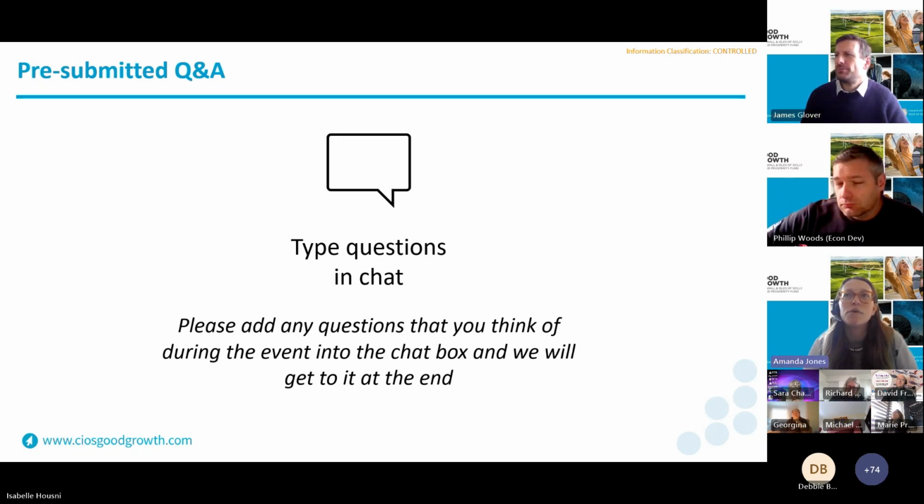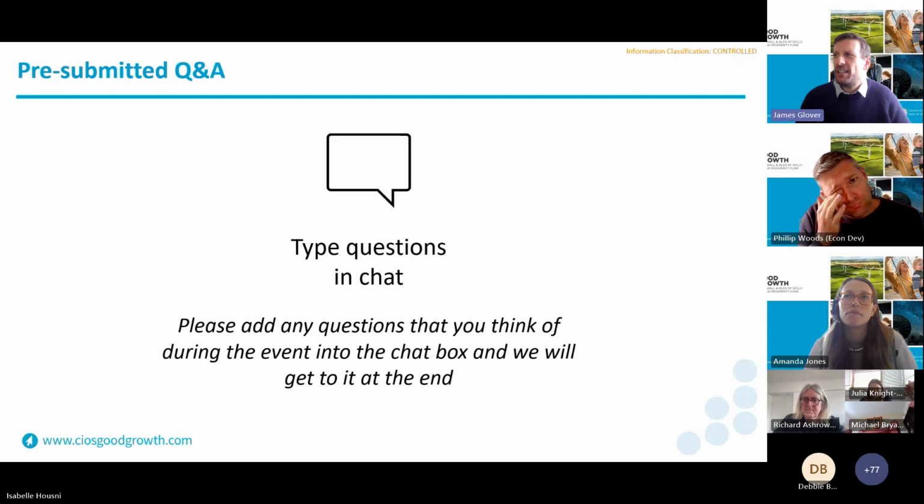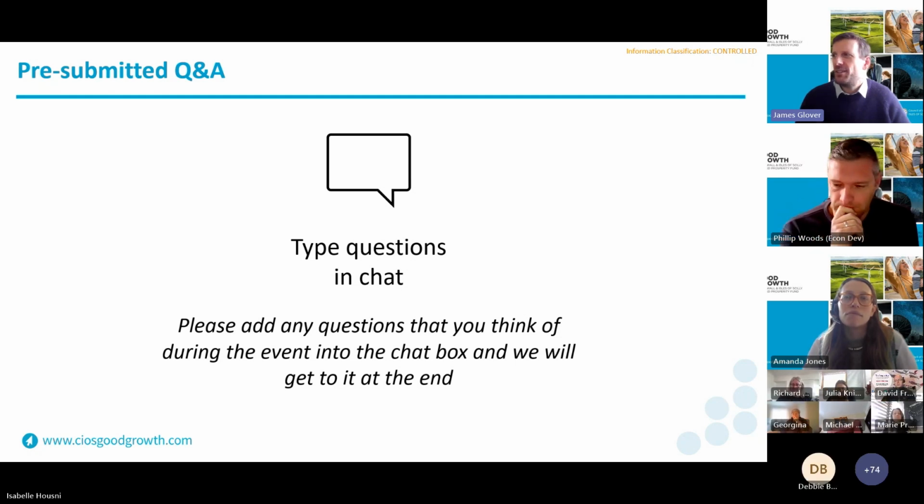Question number 7. Do I need to submit evidence of outputs in my quarterly claim form? Yes, you do, and please see the evidence bank for the types of evidence needed. And also we've mentioned the self-declaration form as well. So I think what we're saying here is, yeah, you do need to submit your claim form quarterly, even if you haven't delivered outputs or you're not claiming expenditure. It also acts as a progress report for us. So you're updating us on where you are with your project. So in terms of outputs, you'd say whether you've achieved them or not in that form.